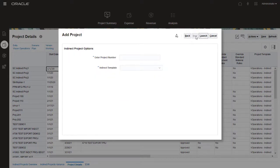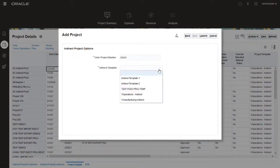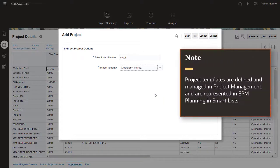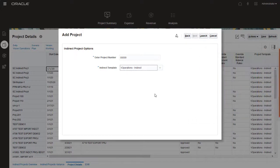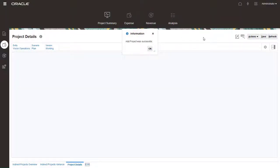On the Options page, enter a project number and select a template. Project templates are defined and managed in Project Management and are represented in EPM Planning in Smart Lists. When you integrate the project with Project Management, the template you select here is used for project creation. Click Launch to create the project.